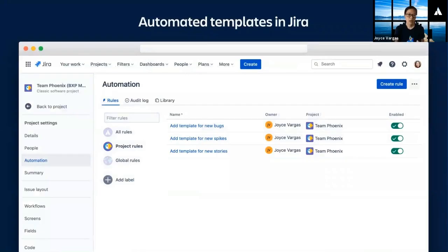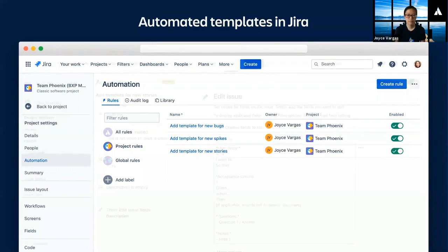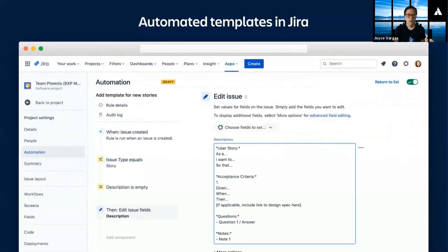We also have a Jira automation rule set up to auto-populate each template, depending on the issue type created. So a story, a bug, or a spike. We simply set up a rule that whenever an issue is created and the description is empty, then populate it with the given template.